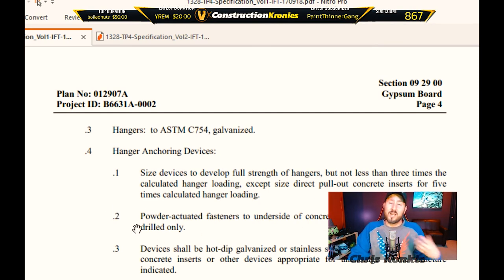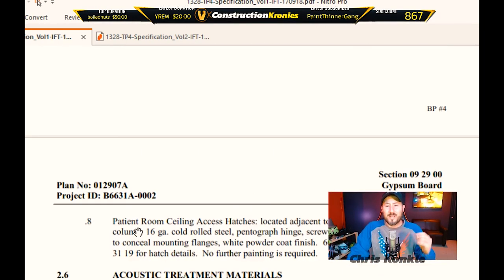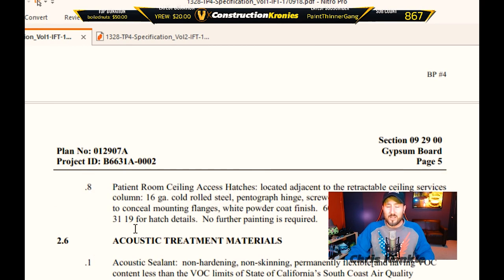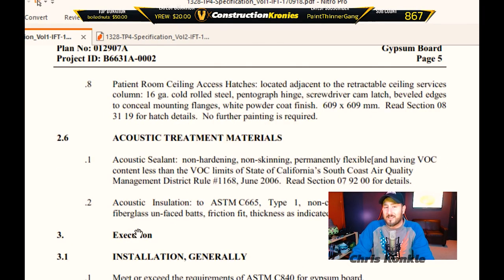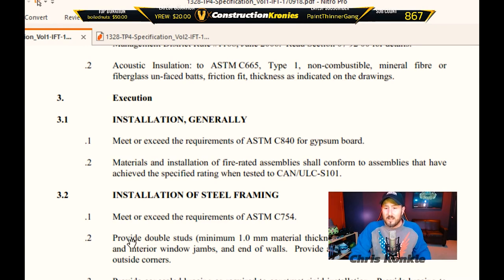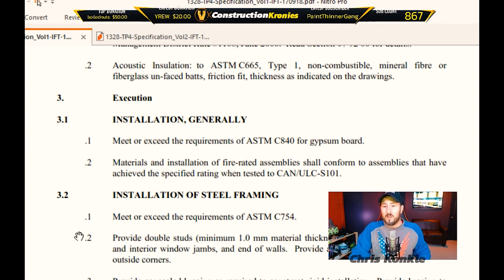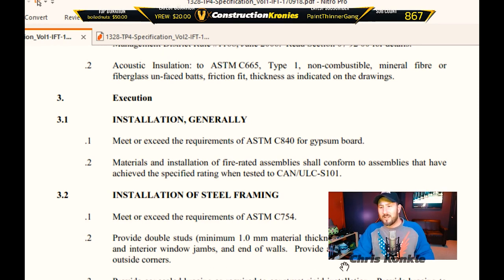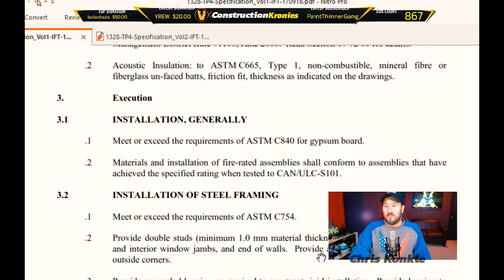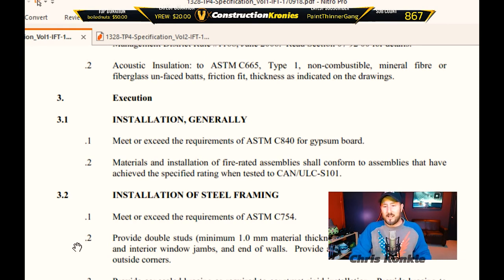It's really important to dig into the specifications and understand everything related to your trade and what you need to coordinate with other trades. If you're doing an RFI, you reference the actual line — for example, section 3.2.2. Installation of steel framing states: provide double studs, minimum one-millimeter material thickness, at partition openings, door and interior window jambs, and ends of walls; provide a single one-millimeter thick stud at all outside corners. That's important to know so you have the right amount of studs and everything is done correctly — there's nothing worse than rework.